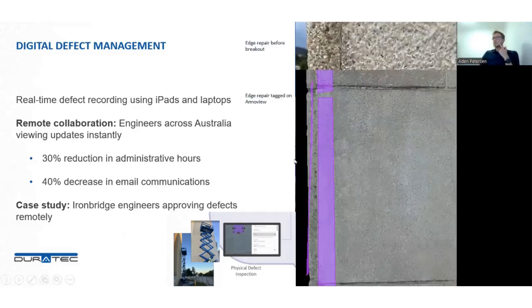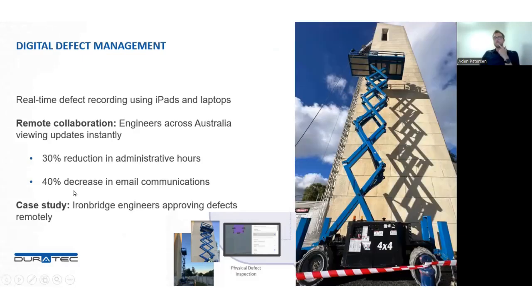For a heritage project where every decision needed careful consideration, this real-time collaboration was invaluable. And like I mentioned, we did save that 30% in admin hours and a 40% decrease in email communications just by having that model.